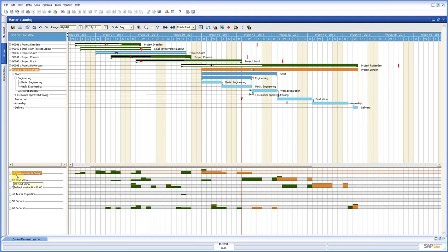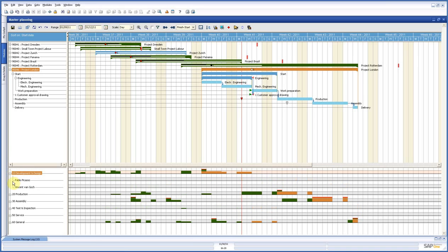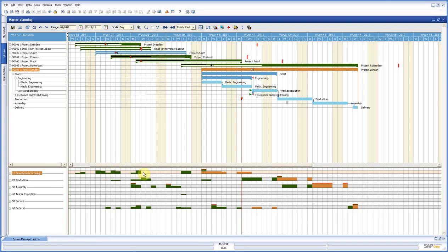Here down left you have your departments, and in the department you see also the information about the capacity. In this case it says 64, this means 64 hours a week. Now, how do we come to that? We have two employees in our department. Pablo is working 40 hours, Vincent 24, so altogether 64 hours, and that's what you see here on the right side in this bar. It's 64 hours of capacity per week.